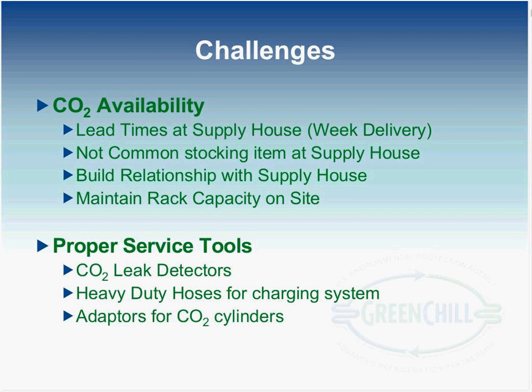Doing a few challenges that we've had with the CO2, mainly CO2 availability. It's not something that your traditional refrigeration supply houses keep an abundant stock of. So there's long lead times when ordering the quantities that we need for our stores. I believe if you look at the first slide, some of the CO2 use was anywhere from 900 to 2,000 pounds. It's not something that the supply houses keep in stock, so you have to worry about long lead times.